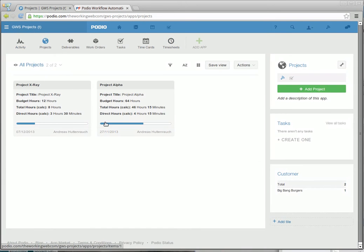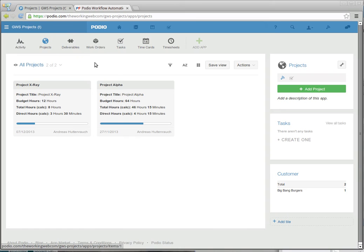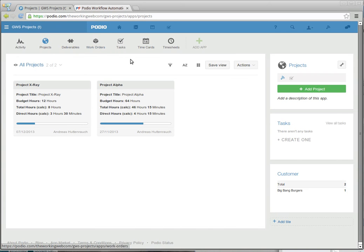Now, the way we have this set up is projects consist of deliverables, and deliverables can have tasks. Work orders are outside of projects, and that's kind of like a maintenance request or other time and materials work, and they can have tasks as well.